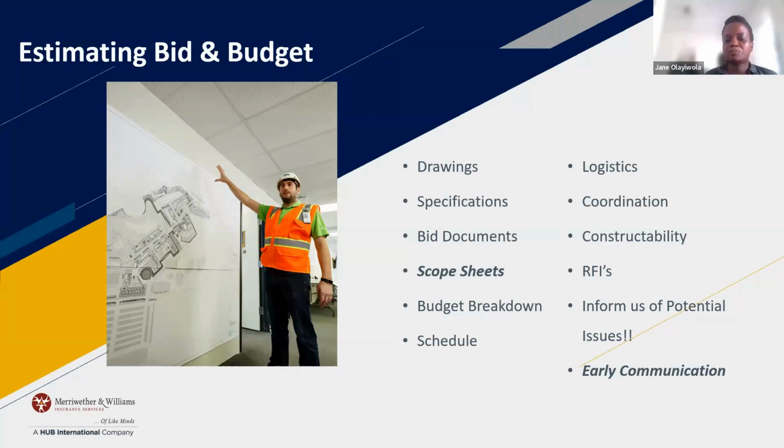Yeah, and just to add on to that, like Jane was saying, buy it early, and then you can invoice them for what's called stored material. So you get it early, and if you've got a warehouse to put it in, then you can go ahead and invoice for that, instead of waiting until you have to install it, because you've got to pay your supplier, right? That's how you can get paid for stored materials, by getting it early to save them.